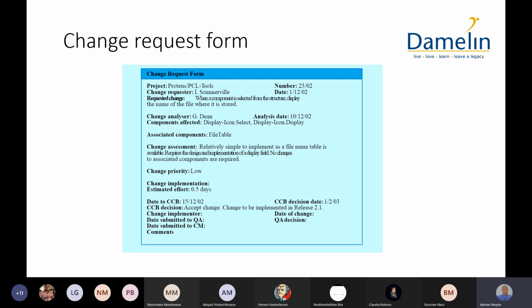We may need to prioritize the high priority changes, okay, because they have a rollover effect on the entire software. The low priority changes are subject to approval as well by the Q&A team, by the assigned board for reviewing the change. Sometimes they may feel like the change is unnecessary, and so the change is rejected, okay? It's all about weighing out the cost. How much is it going to cost us to implement this change, and is it worth it, okay? So this is how a typical change request form would look like.